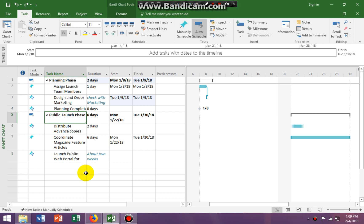I'm going to create - I'm working on item two on page 73. Make task three design and order marketing material a predecessor of task four by using the task information dialogue box. So if I click on task four...